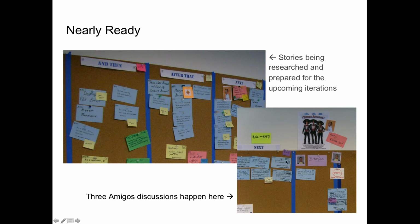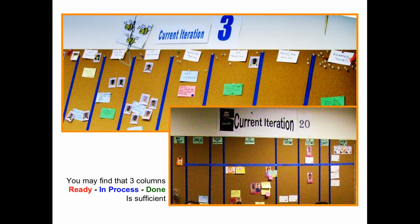They said before anything gets into a sprint, we're going to make sure that all 3 of those teams have talked about it. The testing, development, and product owner BA team. And that means that they have talked together, not individually. They've all gotten together and talked about that story. All visually managing things to get ready for the current iteration. So you'll see different types of Kanban boards in current iterations, visually managing work along tasks. So these are, again, 2 different teams.